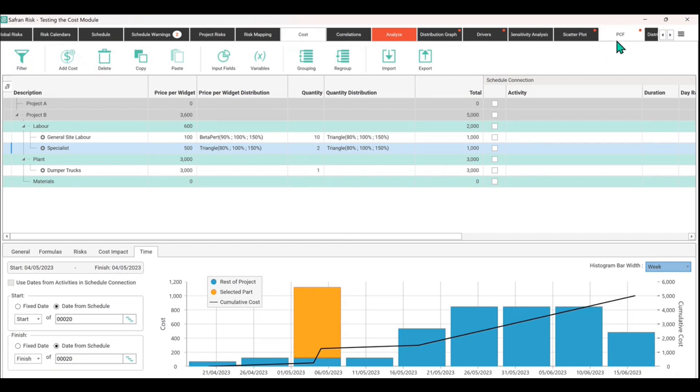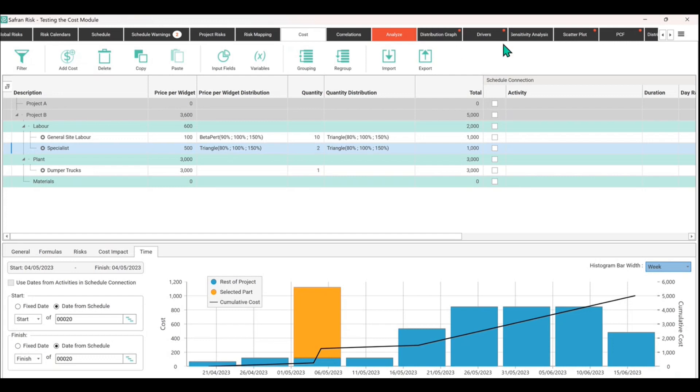If you wanted to look at what's called a probabilistic cash flow rather than this static deterministic cash flow, you'd run the simulation and go to PCF. This would show you, just like we saw with the P-values on the distribution graph, the P80 cost. You could look at P80 of when in time you're expecting to incur cost.